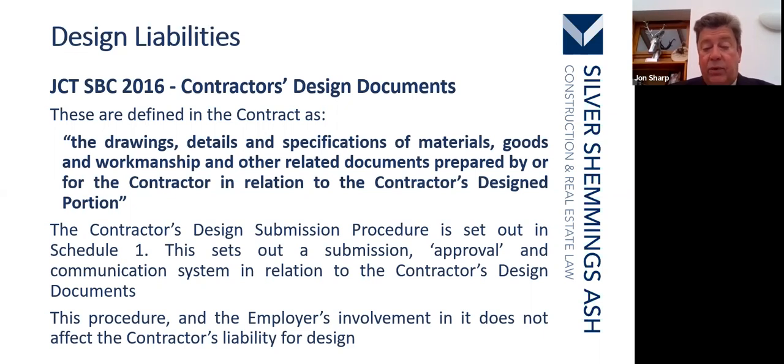This procedure and the employer's involvement in it does not affect the contractor's liability for design. So it's not going to be a defense to say, well, you, the employer, you knew all about this. No, doesn't work. The contractor is still liable for the design.